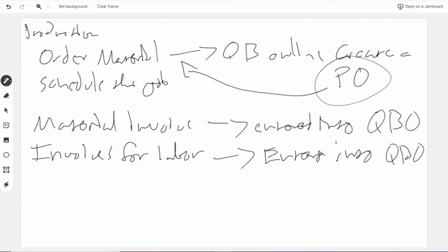With both of those getting input into QuickBooks Online, there are a few things we have to make sure happen. Number one, we have to make sure they enter the specific project or customer that it's for. Earlier I talked about when a job gets approved, it gets sent over to QuickBooks. Well, when this expense comes in, it has to be marked in QuickBooks to that job, so it's got to have the customer entered.